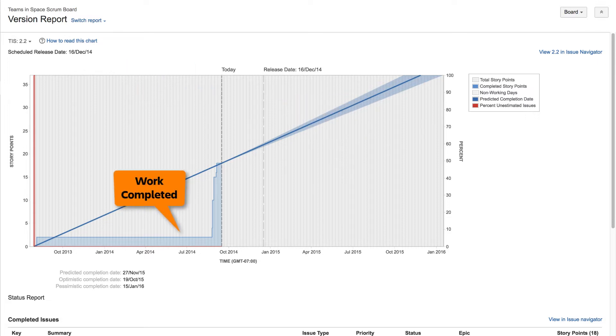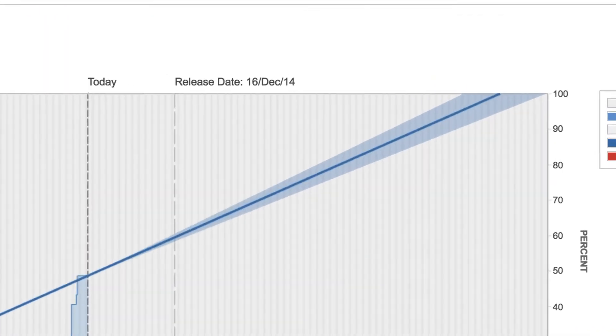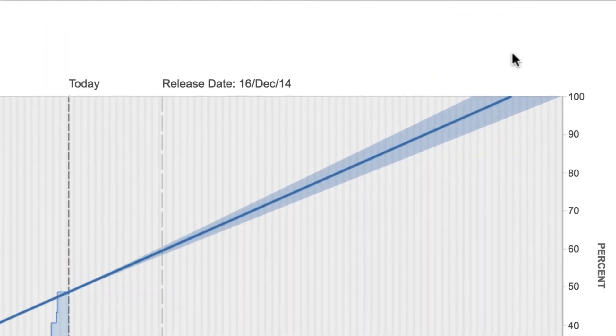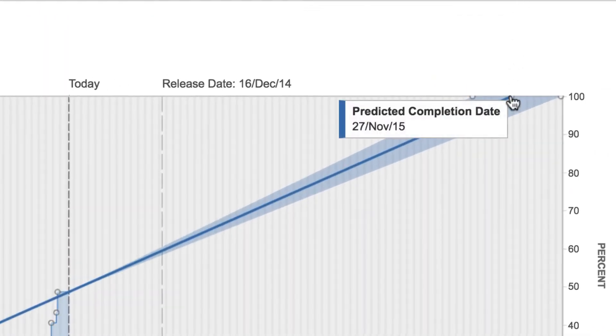The graph shows the state of your version at any point in time in terms of work completed. The blue line indicates the predicted release date based on your average daily velocity and the amount of estimated work remaining.